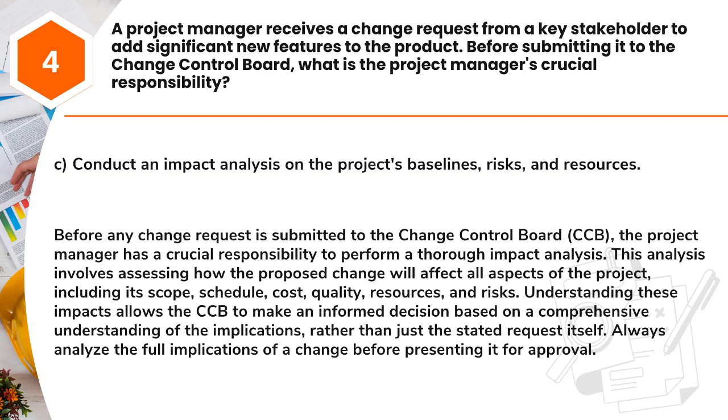Answer: C. Conduct an impact analysis on the project's baselines, risks, and resources. Before any change request is submitted to the Change Control Board, CCB, the project manager has a crucial responsibility to perform a thorough impact analysis. This analysis involves assessing how the proposed change will affect all aspects of the project, including its scope, schedule, cost,